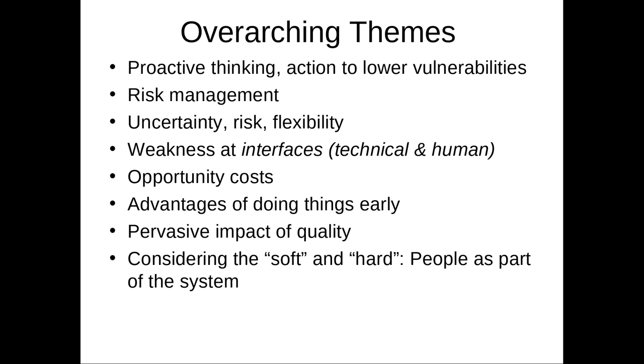A prototype in general, the word is used to denote a throwaway system. A spike prototype more specifically is to focus on one part of functionality. That's right. It's spike in the sense that it focuses on one very narrow thing, like this part of the system. How would we handle this issue of authentication in Node.js? Or to what degree does React play with telemetry?